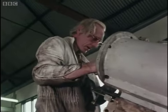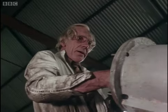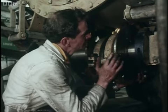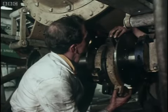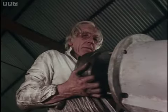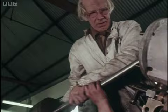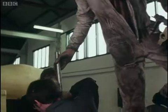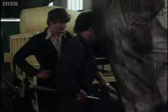It seems amazing to us that a revolutionary new engine could be built from scratch in a busy works in just 5 months. Of course, not all the components of Rocket were of new design. In many cases, Robert and his very able assistants used well-tested items, parts which had been developed from earlier Stephenson engines. He had quite enough to cope with in the way of experimental features in the boiler without making difficulties elsewhere.